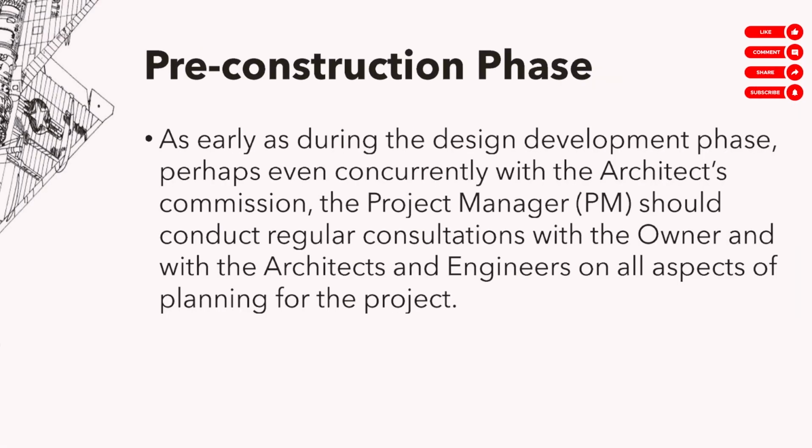Okay, scope of service. Let's start with before the construction. Kailan ba dapat i-hire yung PM? Ang sabi ng standards natin, ideally, during the design development phase, meron ka ng PM. Kung ikaw yung client meron ka na ng PM para masulit mo kasi ang idea nga ng PM is nandun siya from start to end.